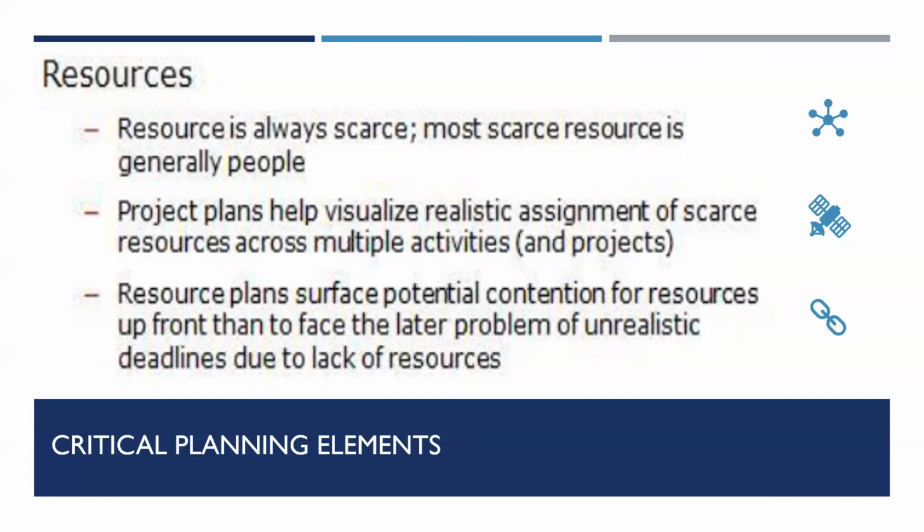Estimating resources involves determining what resources, in terms of personnel maybe, equipment maybe, or material, and what qualities of each resource will be used. So if you have a project plan and it has phases and sub-phases, you need to know or estimate and determine what are the resources in each of these phases and sub-phases, and when each resource will be available to perform your project activity. So the activity resource estimating process is closely coordinated with cost planning, which will be covered within this topic.